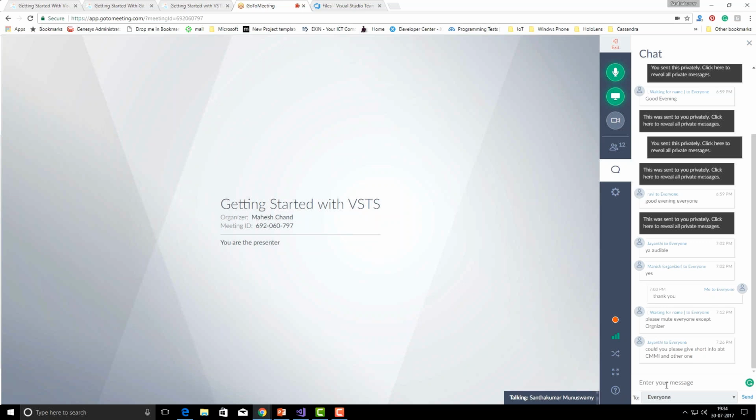You can choose one module, first split it into two sprints based on your priority. Then in the first sprint, you finish all the tasks and deliver to the customer. Then go to the next one, finish everything, then deliver to the customer. This is more specifically from the project management standpoint.